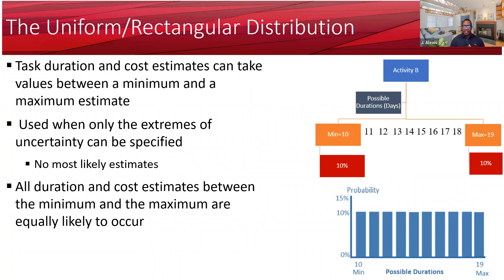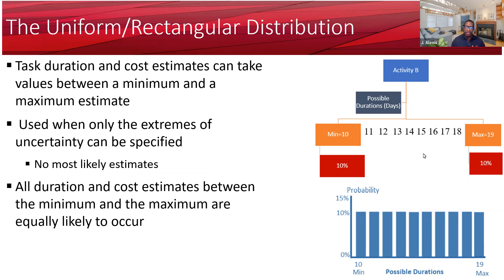Another distribution worth mentioning is the uniform distribution. It is not as popular as the triangular or beta-PERT distributions, but you can use it to model uncertainty in project cost and duration. In this case, you only have a minimum and a maximum, and the chance of hitting any duration or cost between them is equally likely — for example, 10% probability for any value. There is no most likely estimate.